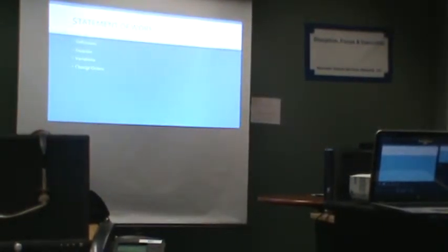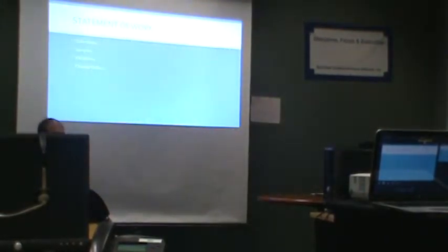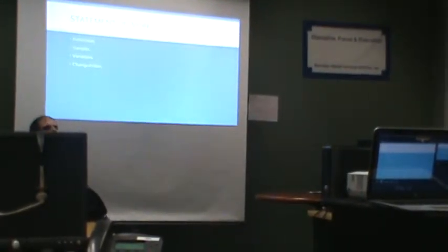Is there a turnaround time on the change form? Typically, it's immediate, right? So it depends on the customer. Well, it depends on the situation and the request and the type of change will determine the urgency, right? If my guy's on site and sees that I need 3 hours worth of network troubleshooting, I gotta have that right now, because I can't have that tech spend 3 hours waiting, right? Because that's not billable. Till I get that change order, that's not billable. However, nobody can turn around a signed document inside of 2 minutes, right?